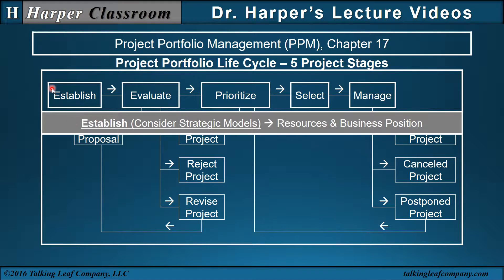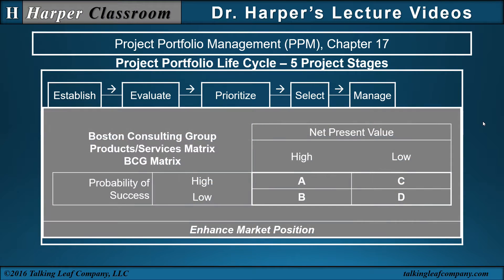Establish. Consider strategic models that will be used to build a project portfolio that will align the resources with the business position. Wysocki identifies four models as examples. The Boston Consulting Group Product Services Matrix, BCG Matrix, identifies the probability of success, high and low, and the net present value, high and low, and places projects within sales categories, buckets that will enhance the market position.